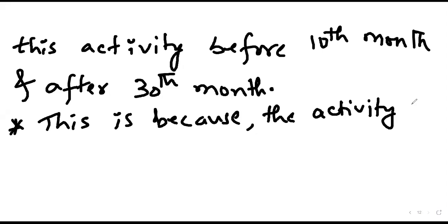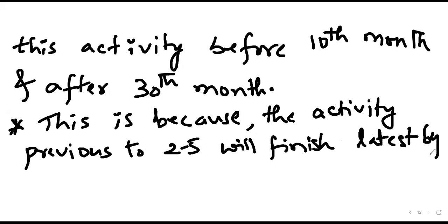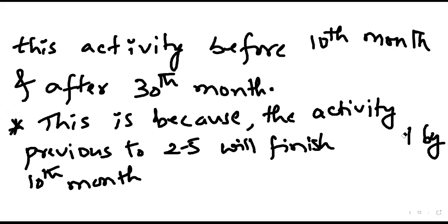This is because the previous activity, previous to 2-5, will finish, sorry, not latest. Earliest possible duration itself is 10. Okay. So you cannot start before that.